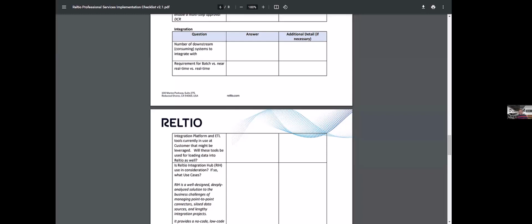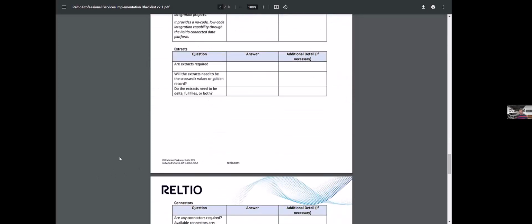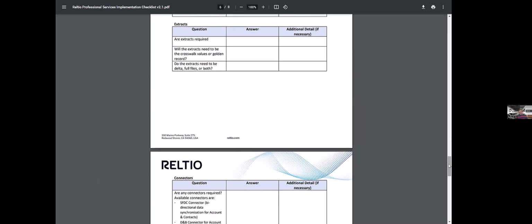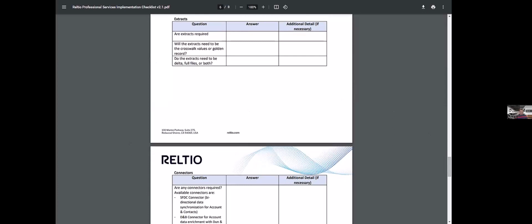And if we are not able to finalize the integration pattern, we can figure that out probably in the first week, because if we are talking about bringing in some additional components like connectors, that requires some infrastructure changes. Basically, we'll have to reach out to the team to get it enabled if it is not done already. So once the integration patterns are finalized, we also talk about the downstream, right?